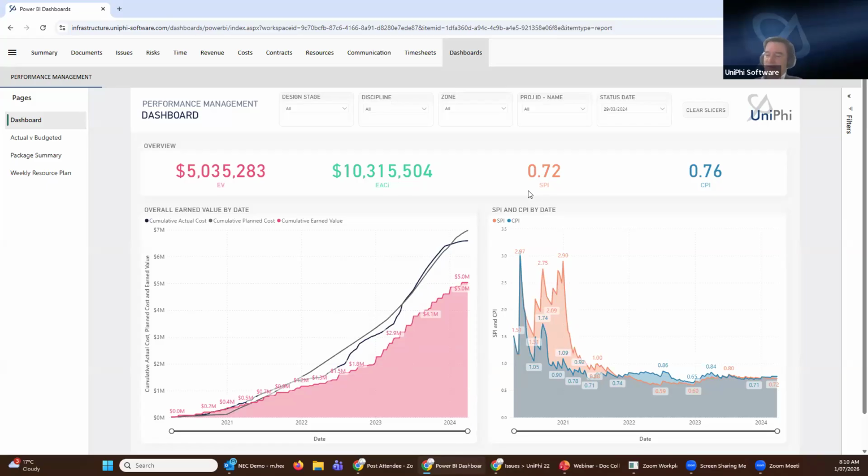Now, what has happened in reality with this is the first 30 to 50% of the project, this has been a significant contributor to the performance improvement of these projects that have been using this product, because these CPI and SPI statistics drive conversation, drive course correction, and either rebaselining or communication with the client, variation, change control, or even just an improved performance.